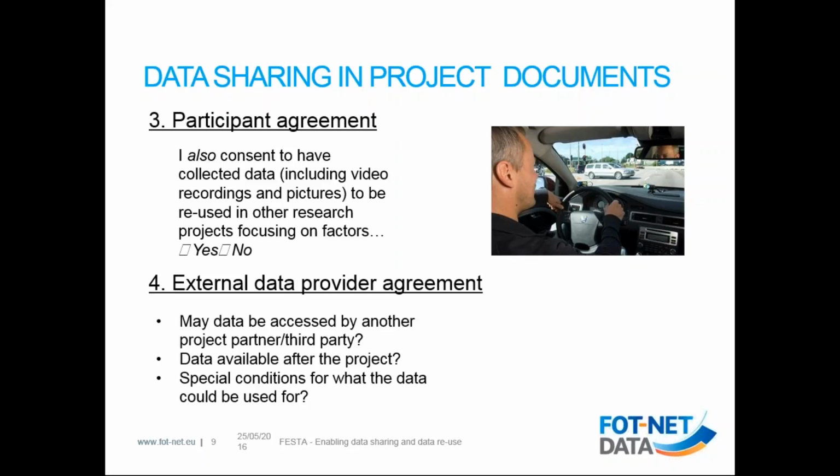And here it is important to discuss that if the agreement might be with one partner in the project, what about the other partners? Can they access the data freely? That has to go into the agreement. Will the data be available after the project? And are there special conditions for use and reuse of data?